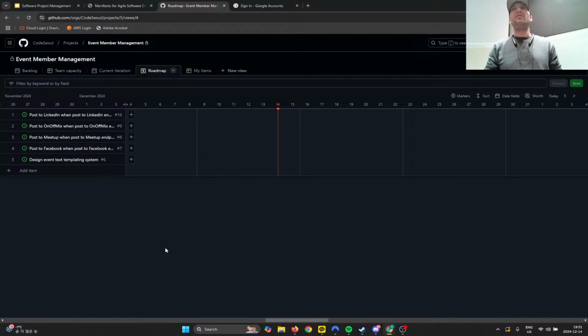But if you have a large number of interconnected teams, Jira lacks some flexibility. For example, let's say that you have a task that multiple teams need visibility on. Now maybe only one team is working on it, but the other team needs to be able to see it. Can you add that task to multiple boards? On a company project, you can. On a team project, you cannot, right?